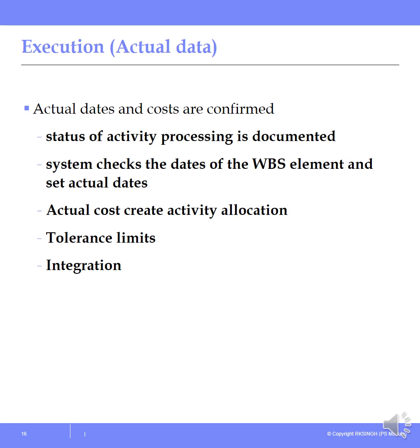As I told you earlier, once the activity is confirmed or work is completed at site, we enter the actual data and quantities and do the service entry sheets. Based on those service entry sheets, we forward to the finance department for payment. As you know, SAP is highly integrated with other modules. If we assign a tolerance limit in those particular activities, then the system will behave accordingly.